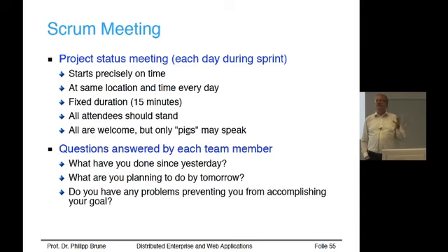Basically, this is sort of a quick meeting. So the Scrum meeting is a checkpoint. It's a status meeting. It's not a meeting for solving problems. Solving problems is done afterwards, separately, in a bilateral way. Okay.